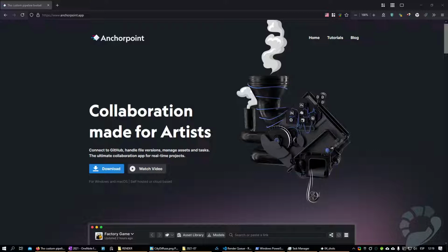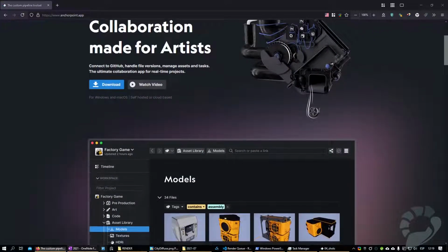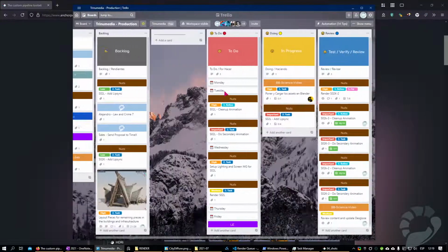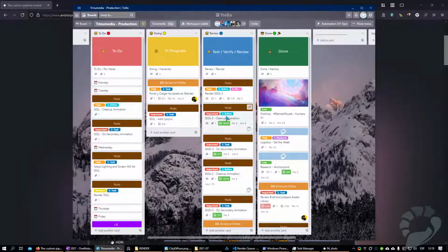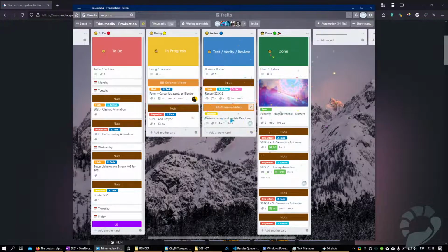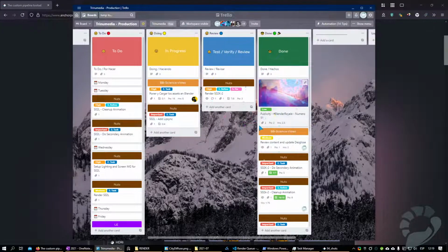Oh, well, in simple terms, Kanban usually gives you what we call swim lanes. So like not started, in progress, complete, for example. So you can have a bunch of tasks like mix the pie mix, create the crust, bake the pie, to keep on your analogy, and then you can assign those to different people, and when they start on them, you drag it into, all right, somebody's working on this.